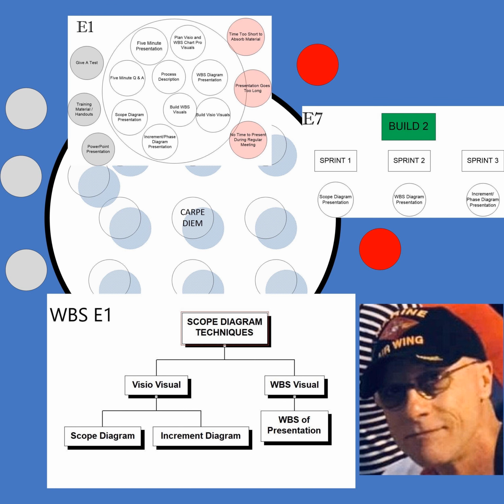At Z, there were certain things that had to be done before we could move in there, and at X, certain things that had to be done. Structured cabling complete. I changed all the dates and everything on here, obviously. Structured cabling complete. Circuit activation. WAN network stand-up begins. WAN network stand-up complete. LAN stand-up. LAN stand-up complete. Switches stand-up start. Completion of circuits activation. Switches stand-up complete. First move. At X, structured cabling complete.